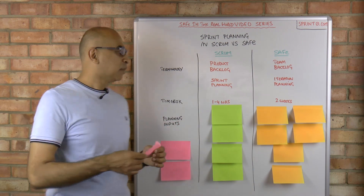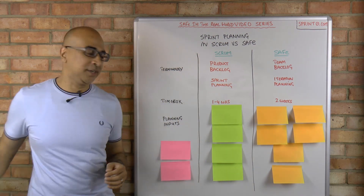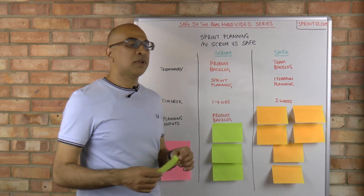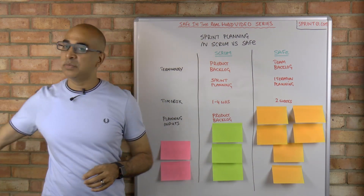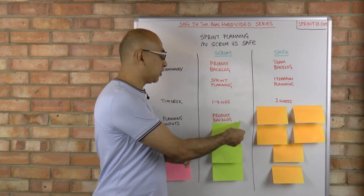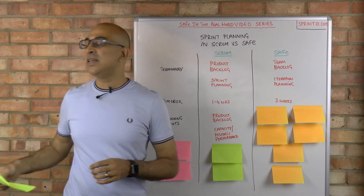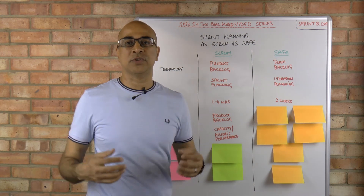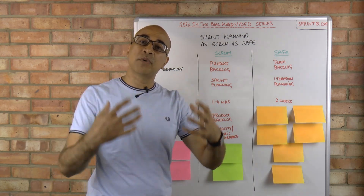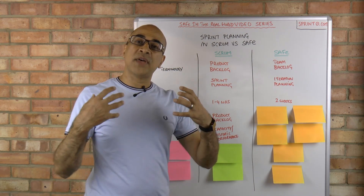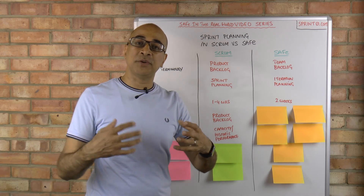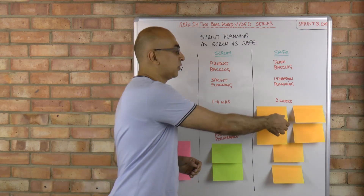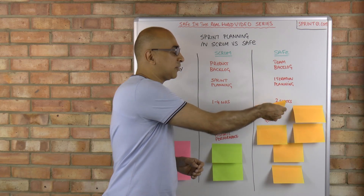Next: planning inputs — and this is a big difference. In Scrum we have the product backlog as input, along with the team's capacity, their historic performance, and the product increment the team may have been working on in previous sprints.